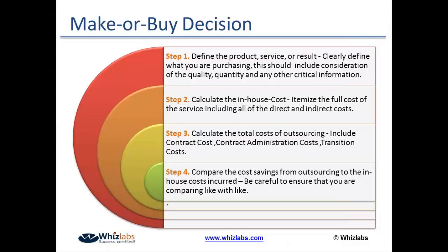If my project is about constructing a building and I want to outsource the electrical and plumbing work, I would raise an RFP stating that these are my requirements, this is how the end product should look like, and the solution would be how exactly they would do the electrical plumbing work, what material they're going to use, what would be the timelines, what would be the measurement criteria, and what would be the final cost.